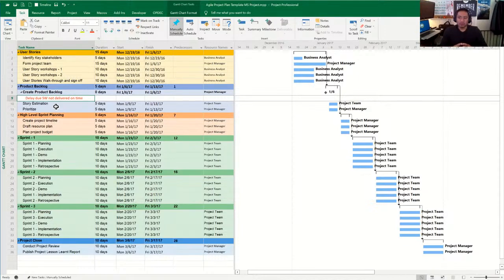That's true. You're also trying to encourage either fixed duration or fixed units for that specific task. Also, is it effort driven, and does it tie to your scope or is it an external task? So those are the questions I ask whenever I'm being thrown that question. The question to me is, okay, is this external? Is this part of the project? Because you don't want to have scope creep.